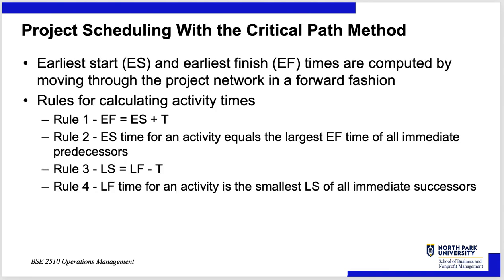Project scheduling with the Critical Path Method: every task has an earliest start (ES) and earliest finish (EF) time, computed by moving through the network in a forward pass. Rules: early finish = early start + duration. The early start time for an activity equals the largest early finish time among all its immediate predecessors. Then there's a late start (LS) = late finish (LF) minus duration, looking at it from the opposite end. The late finish time for an activity is the smallest late start of all its immediate successors.